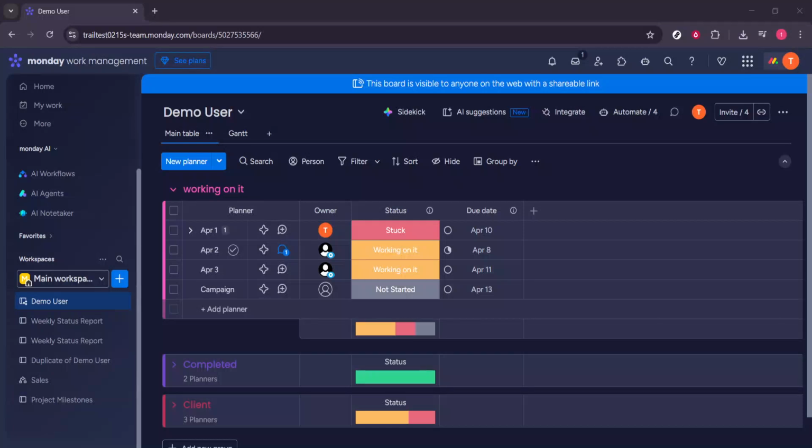In today's video, I'm going to teach you how to auto-populate timeline in Monday.com. Easiest way, 2026 guide. We'll set up a simple automation that fills a date for you the moment an item's status changes. This is perfect for keeping timelines and due dates accurate without manual updates, and it works great with timeline or Gantt views that rely on your board's date columns.